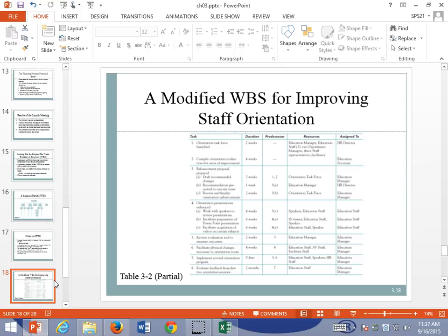Yes. But we know that it's going to be subject to change, especially in an agile environment. Construction is certainly subject to change. And so when we change those work breakdown structures, we have a constantly evolving document that says, well, this bricklaying, we thought it was going to be 10 hours. It really took us 12, and we can then change our budget and change items in the future to make up for it, because we may have budgeted for 10,000 man hours total. And so we have to change the rest of the project around it.